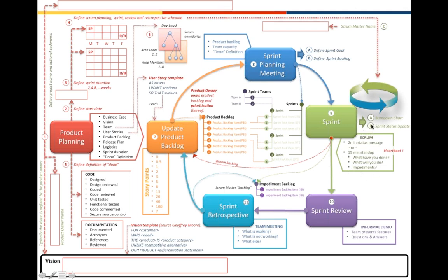We looked at Kanban last time, and Kanban is a great visual way of keeping a tab on the progress. If you have a blocked column in Kanban, as a scrum master, your priority becomes to remove everything from that blocked column. There should almost never be anything in the blocked column. The moment you find a blocker, you have to resolve it. That's where all the action is happening.